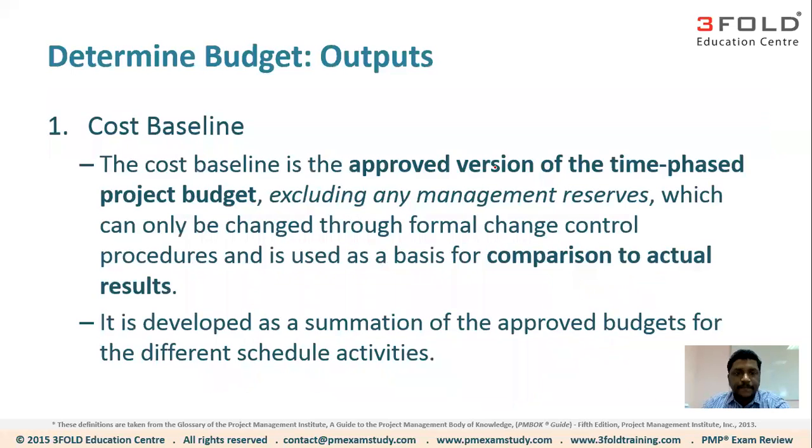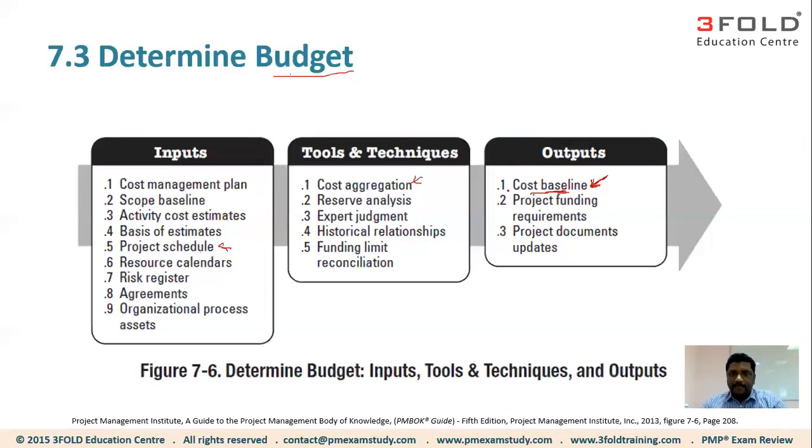Okay, let me go back. I would like to explain a few more concepts to you. All right, and I'm not going to talk about the rest of the tools and techniques. So basically, we need to have the cost estimates. We need to have the schedule. When we have these two, along with the cost aggregation, we can prepare the cost baseline.